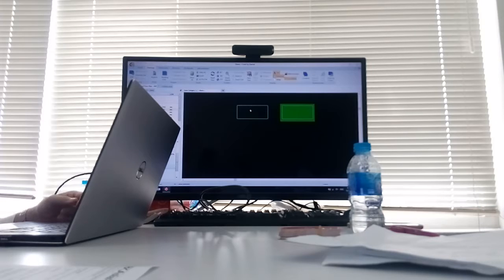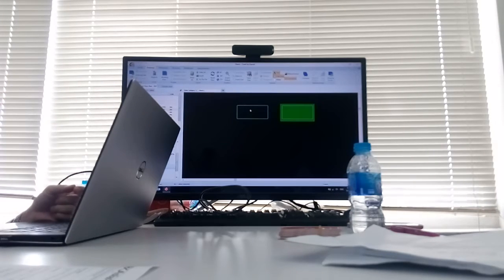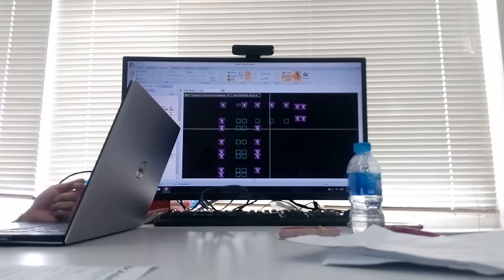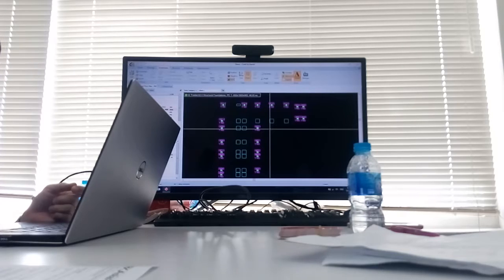This one is not highlighted, though by the bare eye it looks the same. Maybe when we look closely the line is not the same line, and the dimension is different. With this, I just click accept. When I come back to my dimension group, there are 46 in total and the label is there. So you can use this auto count feature to find all the file caps.